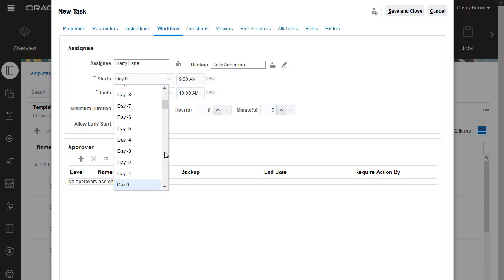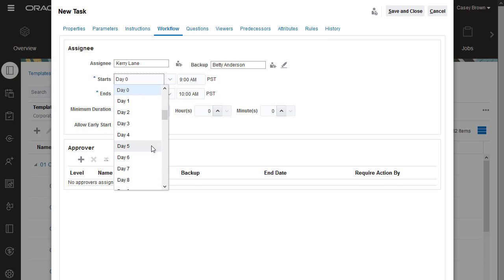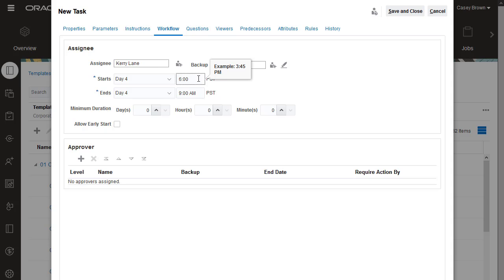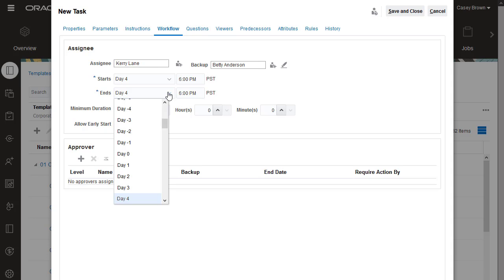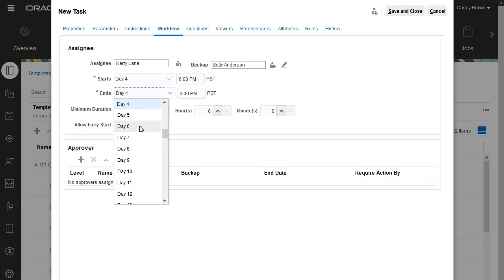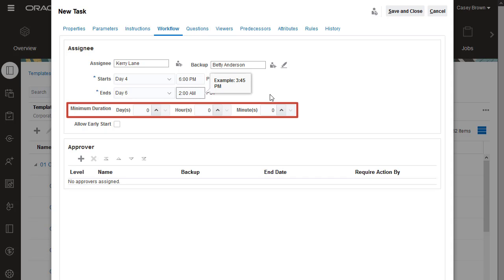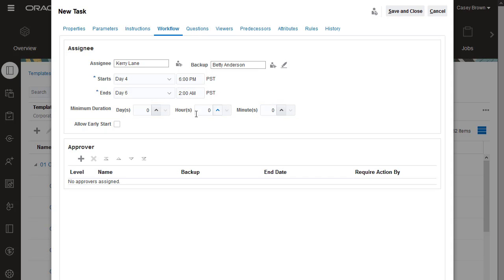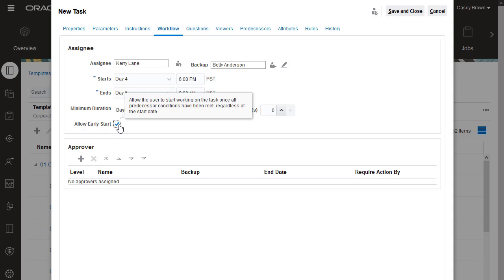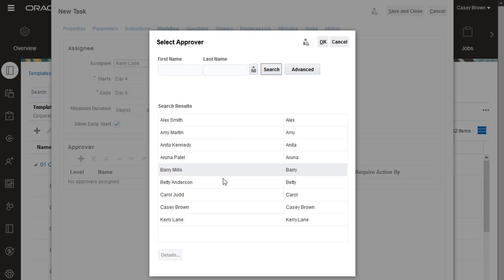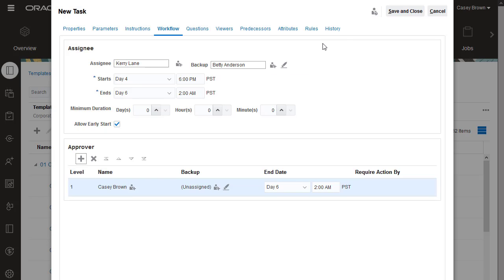Next, assign a start day and end day. You can also specify a minimum duration expected for the task. Select Allow Early Start to allow the assignee to start the task before the specified start day and time have been reached. You can optionally assign an approver and a backup approver for the task. You can have up to 10 levels of approval.